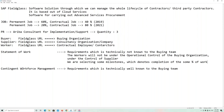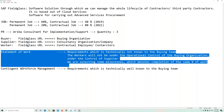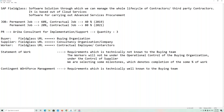As a buying team you define milestones — for example, first milestone represents 25% of work completed, second milestone 50%, third milestone 75%, fourth milestone 100%. The supplier manages the workers to complete the work and informs you when a milestone is done. As a buyer you just verify the milestone completion. This is how Statement of Work works at a high level — there are many detailed processes within it, but this is the picture from 20,000 kilometers above.